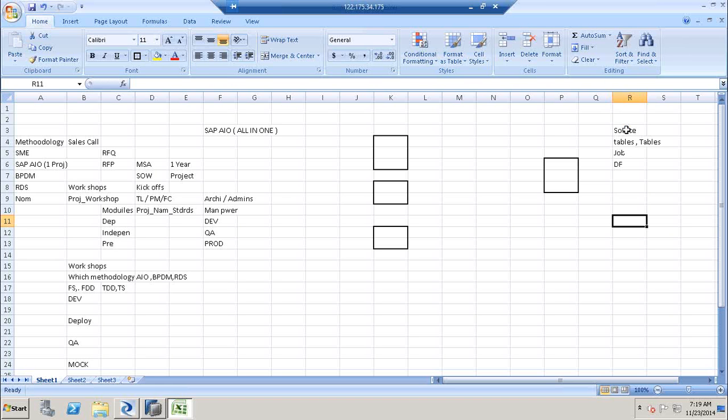So once you create the technical design document or technical specification, that will be reviewed by your senior folks, or there will be a review team who will do a peer review on the project. Once the peer review is done, it will be given for a code review on the TDD.